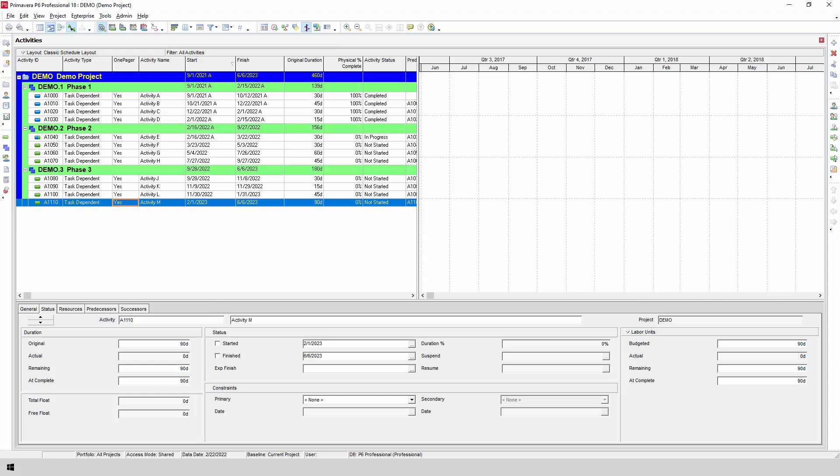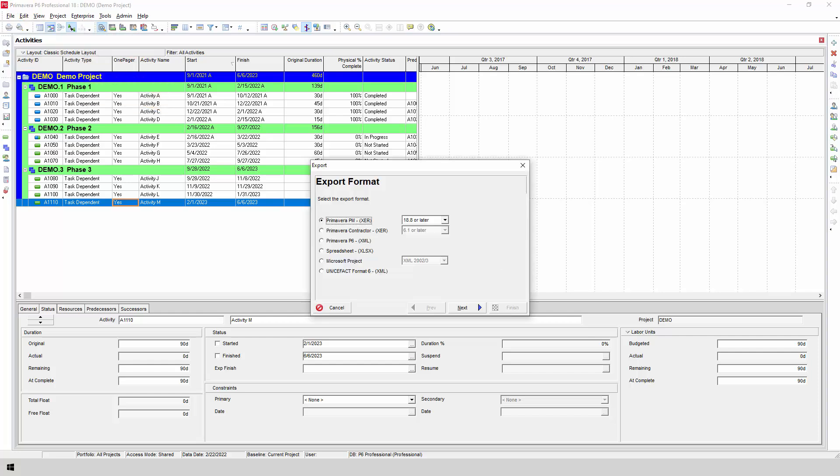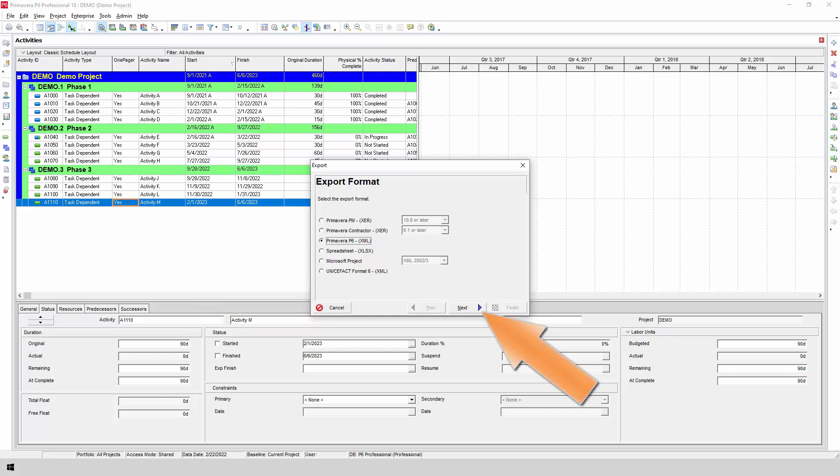it's time to export your P6 plan into either an XML or an XER format so that it can be brought into OnePager. Go to File Export to launch the Export Wizard. Choose whether you want to export your schedule in XER or XML format. Generally speaking, we recommend XML, but you can experiment with both formats to see which works best for you. Click Next.